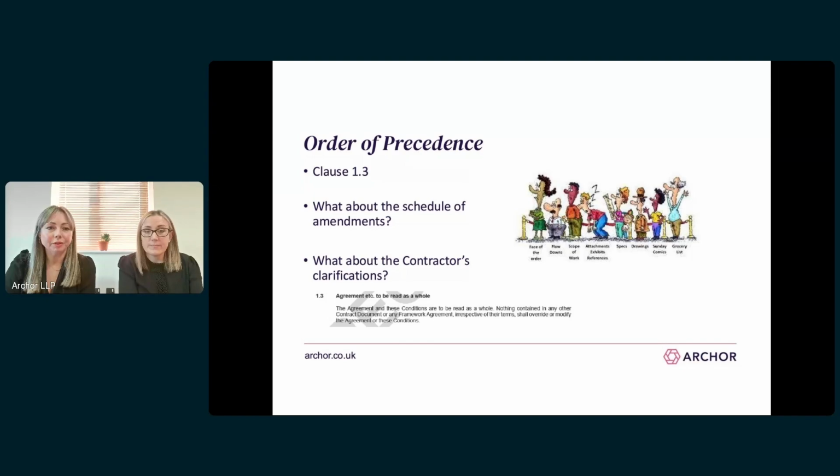Now, just a final point on this, and that's about contractors' clarifications. We see this a lot, that the contractor provides a list of clarifications or assumptions at tender stage. However, these need to be expressly referred to in the contract to have any effect.